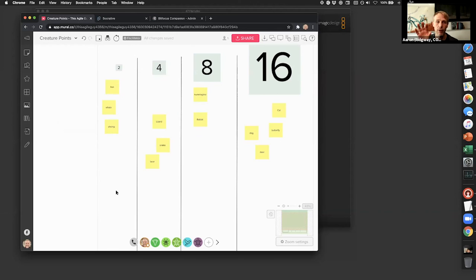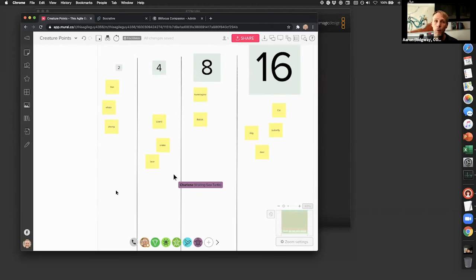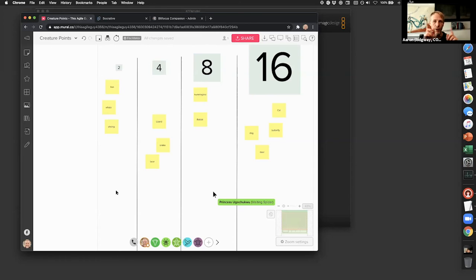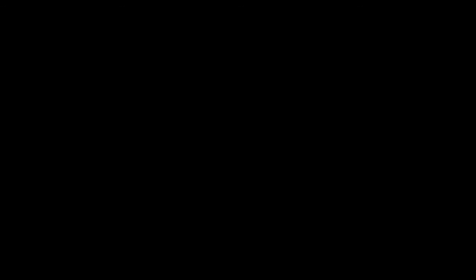It's called the team estimation game. You can play the top card, or you can move one that's already been played, and then next person goes. When we do this for estimation, no talking. Talking sometimes gets in the way of collaborating. We wait for all this stuff to settle, and then the ones that keep ponging around and wind up in the question mark bucket are the ones that we then talk about and try to settle on the size of.